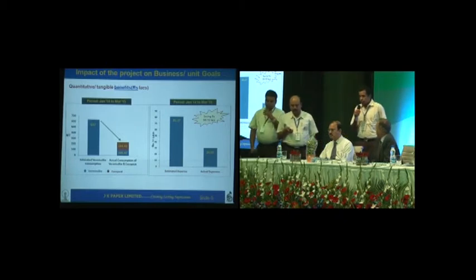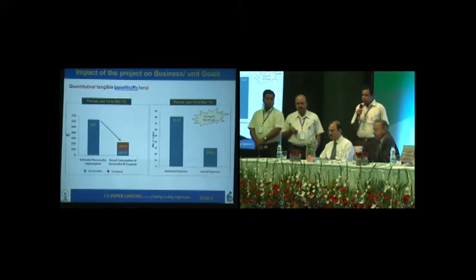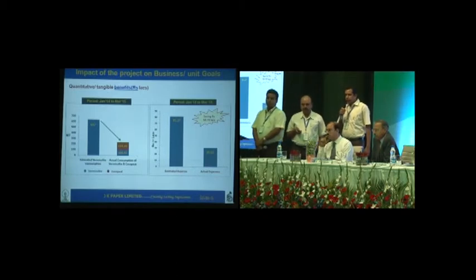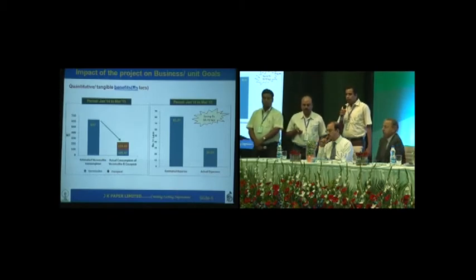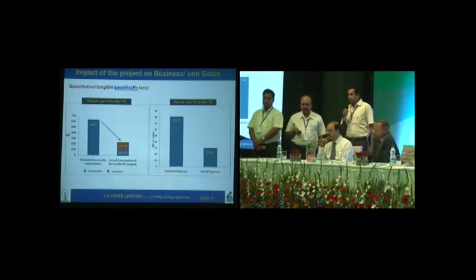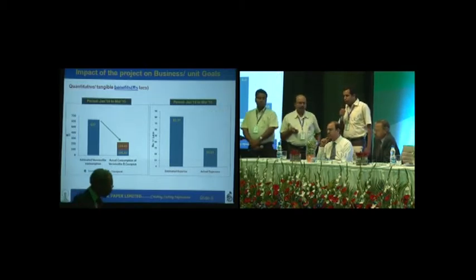Coming to the quantitative and tangible benefits: our project period is 15 months. In that period, the estimated vermiculite consumption was 637 metric tons, but we actually used only 105.47 metric tons and substituted with 134.43 metric tons of coco peat. Against an estimated budget expense of 81.37 lakhs, we actually spent only 30.65 lakhs, resulting in a saving of 50.72 lakhs.